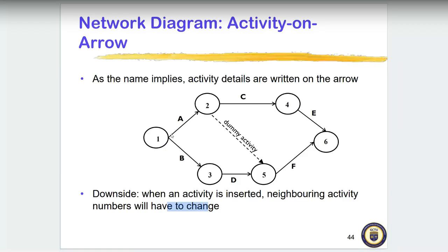So you can tell that A precedes C, and then A precedes B, meaning C can only come after A is done. When I say precedence, I mean that you can't have C unless A finishes the work it is doing. So it is like we are running a baton.